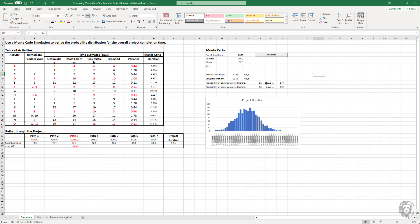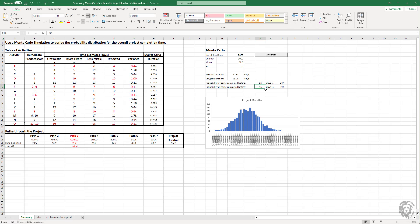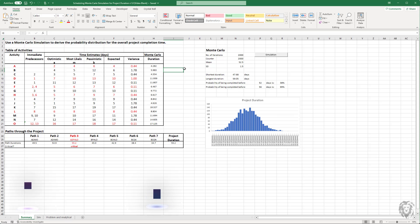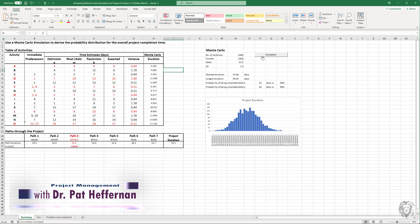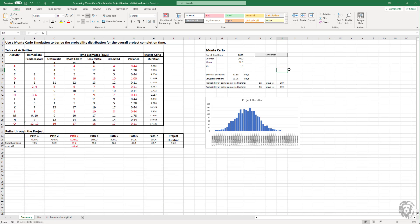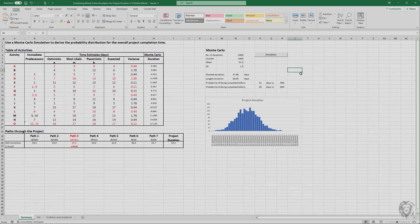You can certainly demonstrate what's going on and you can have a more rigorous control. So now we see probability of being completed before 51 days. You want to change that between 52, 56 days is 99. So it gives you a lot of good information. So we can go ahead and mitigate various tasks and update the information associated with that and run our simulation again in fairly short order. So hopefully those enhancements are a value to you and you can apply them to so many different cases. I've got one similar to this where I'm looking at project costs where project costs are a function of time. So we're looking at random variables in time as well as cost and it works really, really well. So hopefully that's useful to you and we'll see you back here again when we have something new.